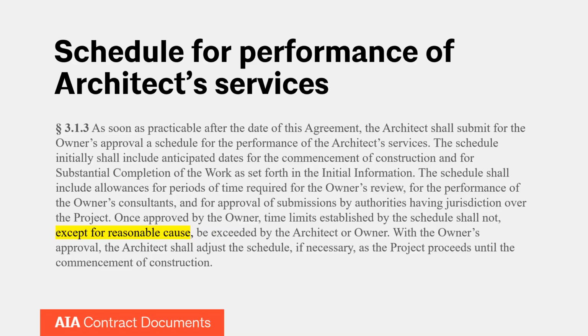Just like when we were discussing contractor delays, there are some good arguments out there, depending on your particular situation, that could warrant your services being delayed due to reasonable cause because of workforce shortages, delays in being able to get onto a project site, or just the health risk of being able to get onto a project site to do things like punch lists. So again, they're all fact-specific inquiries, but I think there are some good arguments for delay of an architect's services, or accommodations that might need to be made for an architect performing their services.